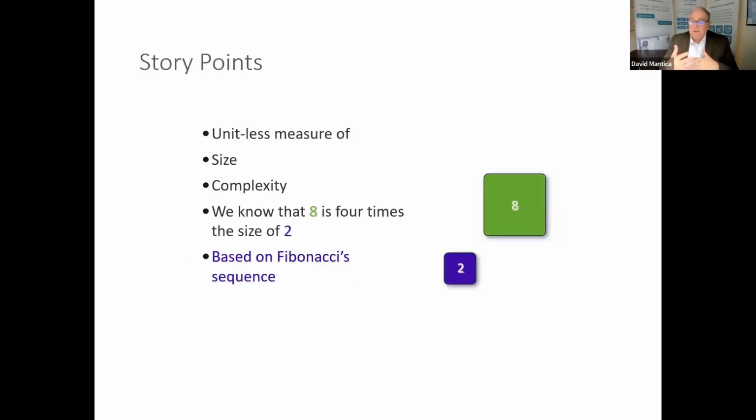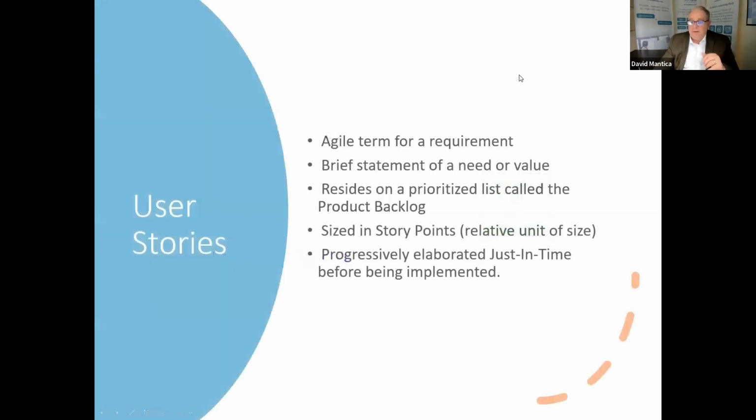And that's where you'll see this idea of story points. So now it's level of effort. The story points are based on the Fibonacci sequence. So they're trying to do it from a non-hour-related mindset, and you're ultimately looking at levels of effort. When you get into the Fibonacci sequence and go into the hundreds, Agilists like to see if you can break that down, because if it takes that much level of effort to do that user story, then that user story needs to be chunked more because you're missing things. There might be something in there that we need to know about that you're not telling us. So you want to keep your story points tight, in a tight range, and you're looking at level of effort. And planning poker is a game that you play in an Agile class around doing that better.